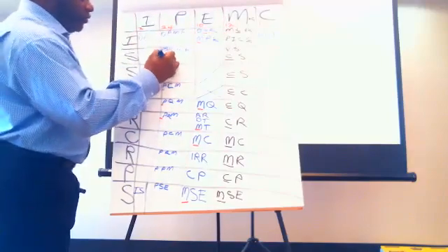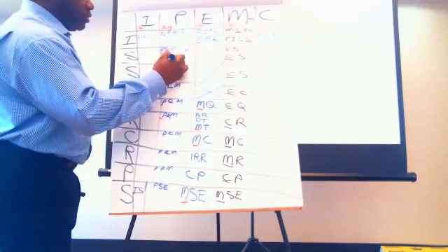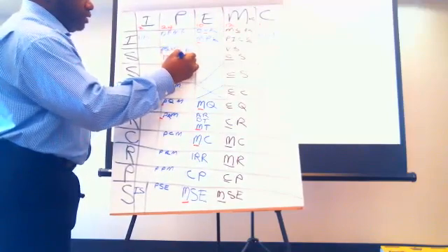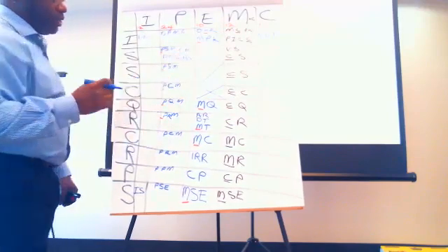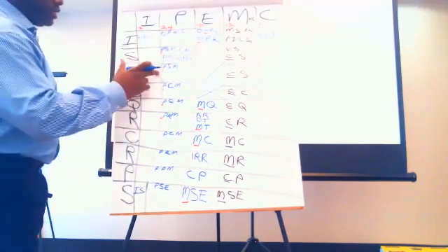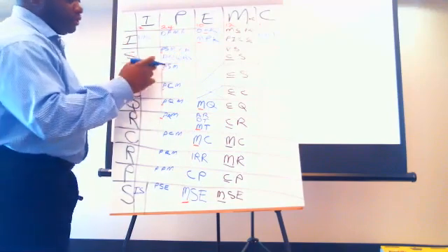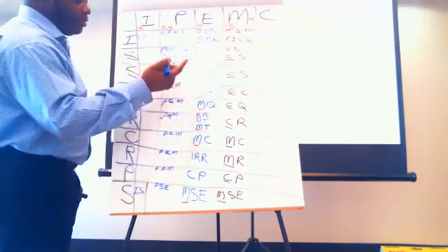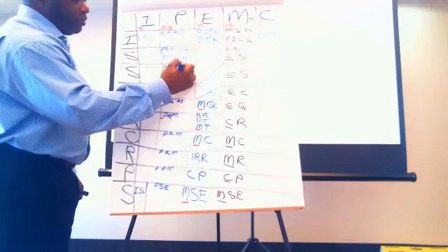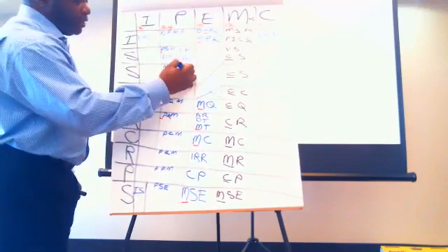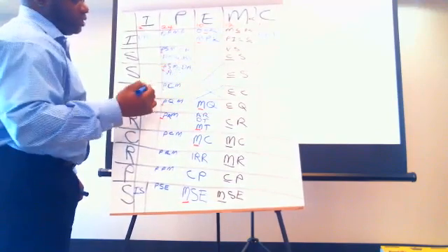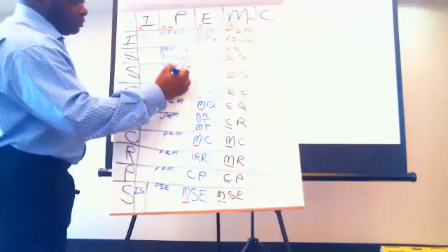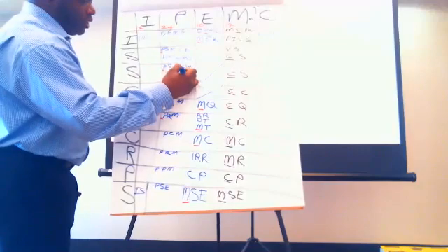So now we have define scope, and of course, your WBS comes into play, or create WBS. Okay, going into scheduling, we've been through the motions. You plan how you're going to do it, and then what do you do first? You define activities. Then you put them in order, sequence activities. Then you're thinking of duration, estimate activity durations.